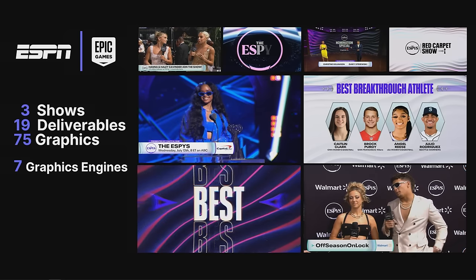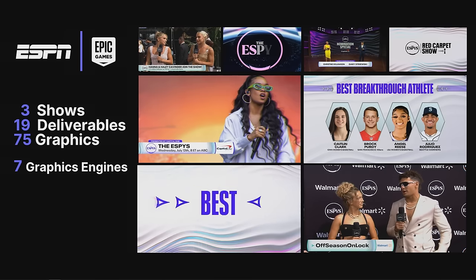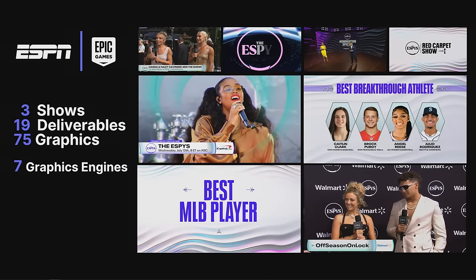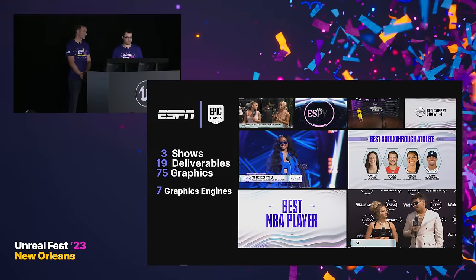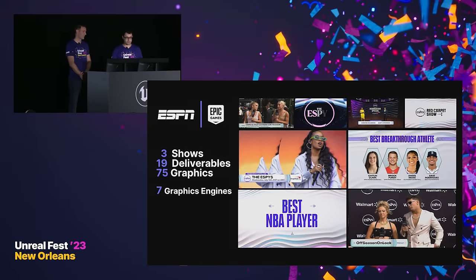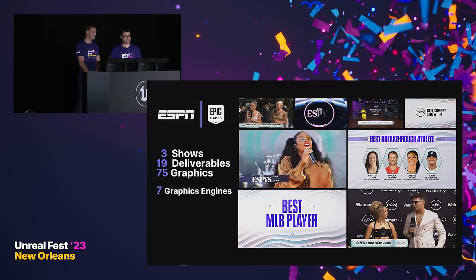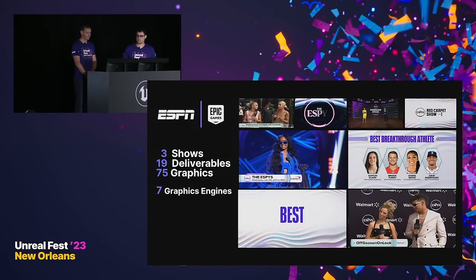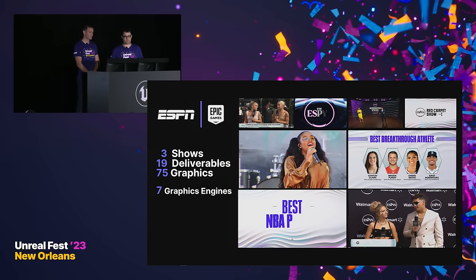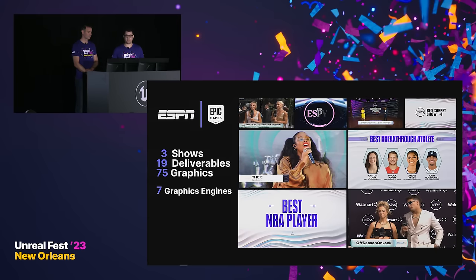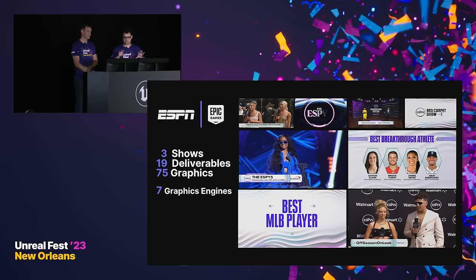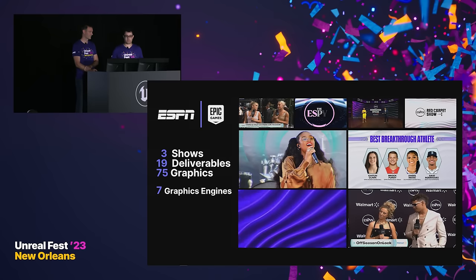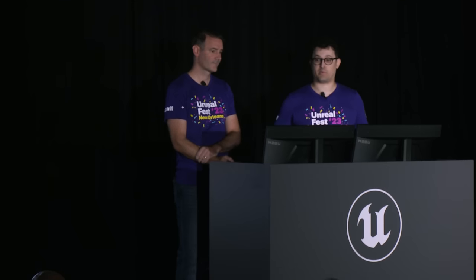The deliverables for this project were pretty ambitious — three complete shows, one including a live show that was essentially the red carpet equivalent. That's 19 deliverables, nothing to sneeze at, with 75 total graphics running across seven graphics engines. There's the ability to switch looks at any point because each show had its own change in the color scheme, accommodating all of those across lower thirds, full screens, and various other studio elements they required.